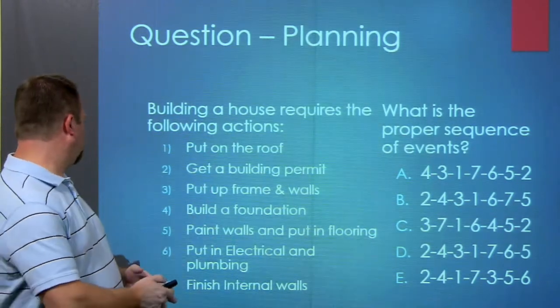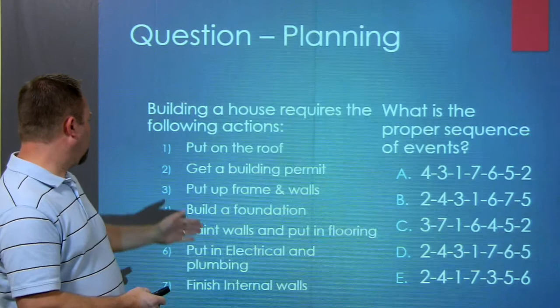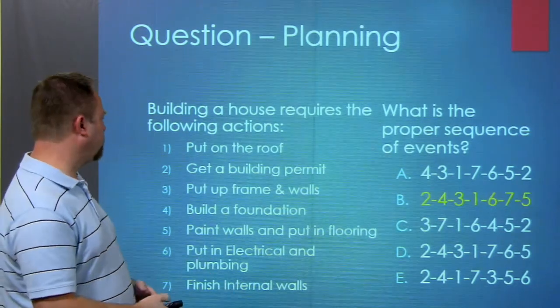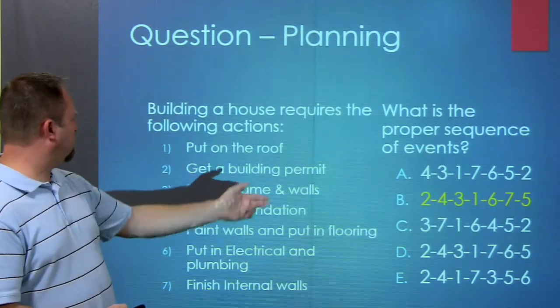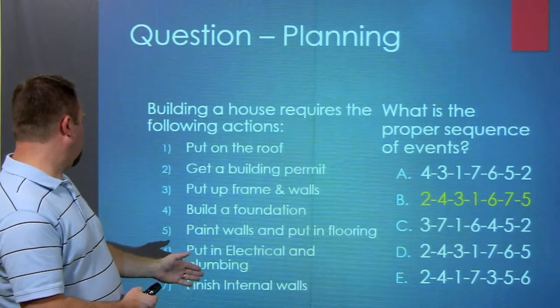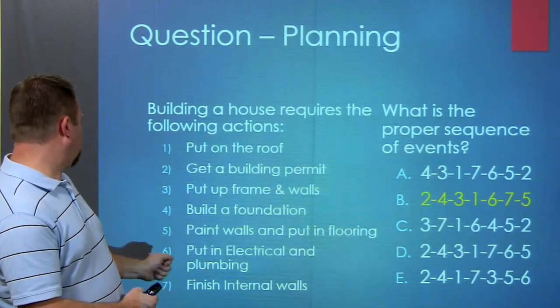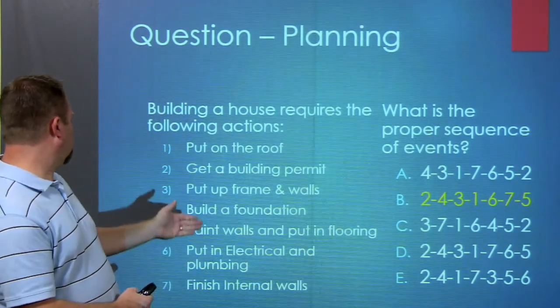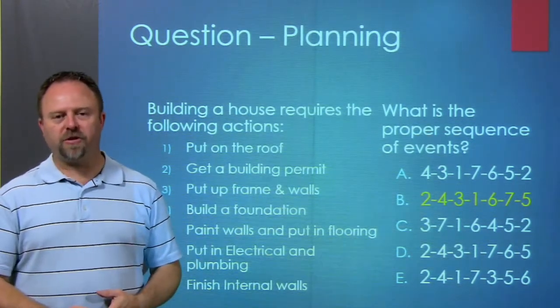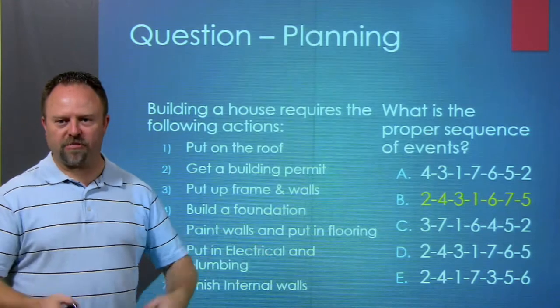So step 2 would be a good thing to start off with, and putting in a foundation would be a good next step to make sure that you have a good foundation for your building. And as you go through the rest of these steps, putting up the frame and the roof, putting in electrical and plumbing, and then finishing the walls, and then painting the walls. Okay, so that would be a good, proper sequence of events that would get the house built in time.